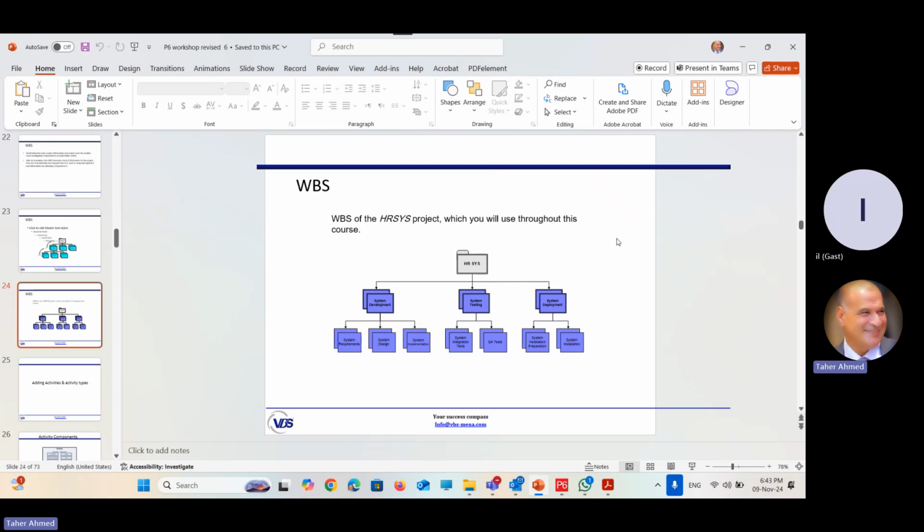Yes, we understand. Any recommendation of which technique we are going to use in breaking down this scope into smaller pieces? The civil engineer raised his hand and said that, yes, it's better to do it like that. Starting with the project at the first level, then at the second level, we will make the substructure for all the work under the zero ground. Superstructure for the civil work is higher than the zero level. Finishing work, mechanical work. And those will be the second level of the project.